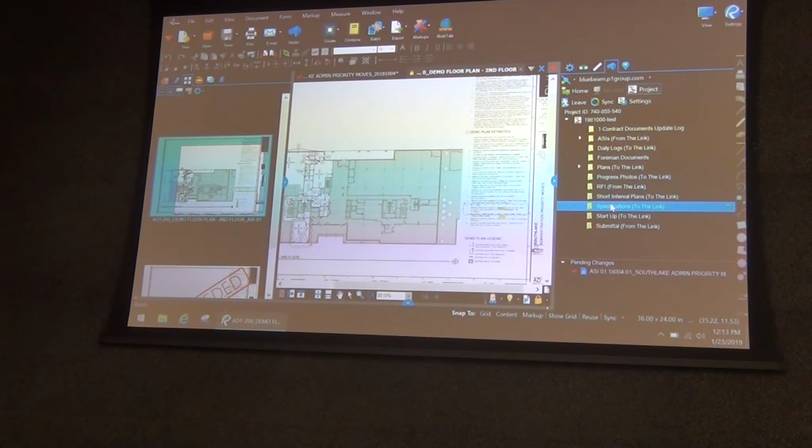We don't use a set because the set is not compatible on the iPad app. So we tried using sets at first because when we saw that, it was a really cool feature, but it's not compatible on the app, and they've stopped developing on the app, so it's never going to be an option on the app. So what we came up with was extracting all the sheets individually, running batch link, and having them all link up to the table of contents.